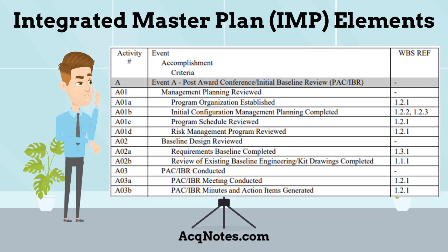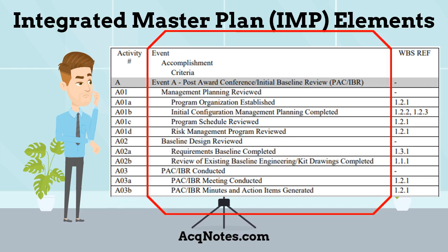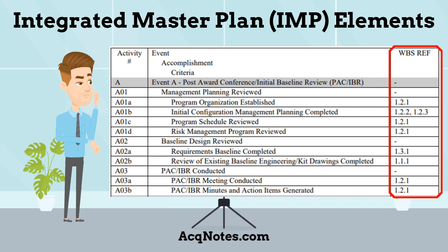Here is an example of an Integrated Master Schedule from the guide located on the ActNotes webpage. In the left-hand column is the activity number for each task. In the middle column is the event, accomplishment, and criteria section. And in the right-hand column is the reference section to the work breakdown structure.